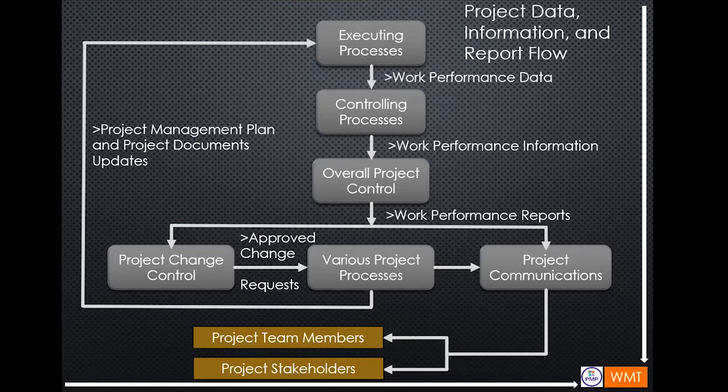So in my project, I practice not to rely on data alone. I normally visit the site regularly to confirm the actual progress, or ask someone to take photos or check the live video. Now in our project, it is required to install live cameras with passwords.